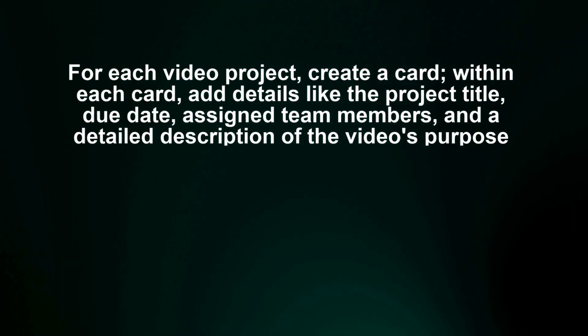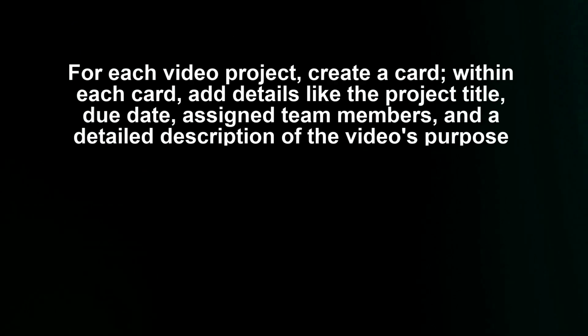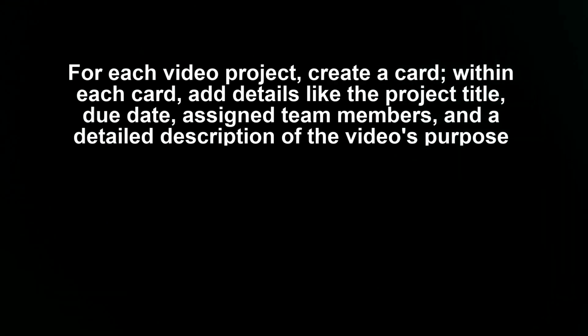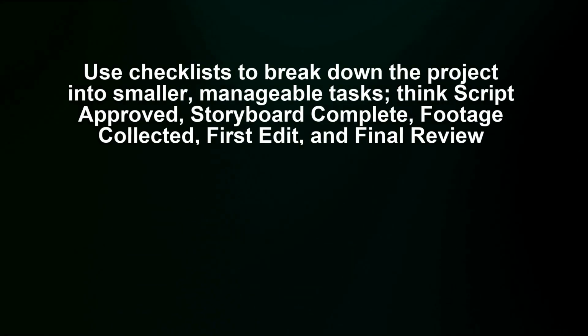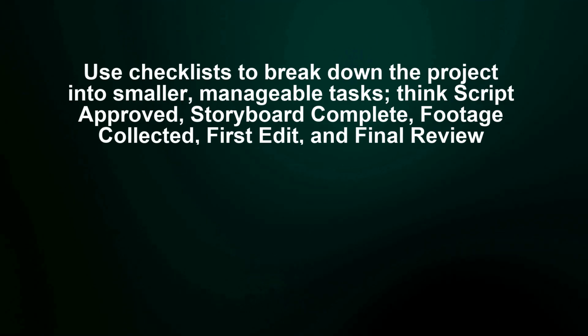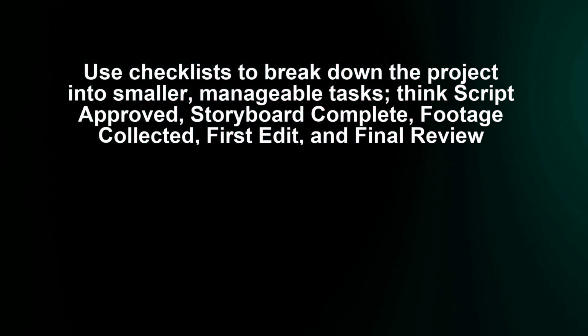Within each card, add details like the project title, due date, assigned team members, and a detailed description of the video's purpose. Use checklists to break down the project into smaller, manageable tasks. Think script approved, storyboard complete, footage collected, first edit, and final review.